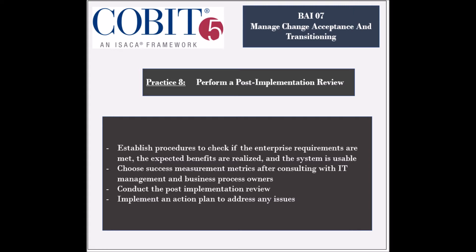The activities involved in this practice include establishing procedures to ensure that the post-implementation reviews are successful. The reviews should confirm if the enterprise requirements are met, if the expected benefits have been realized, and if the system is stable and usable. The success measurement metrics should be agreed on with the business process owners and the IT technical management.